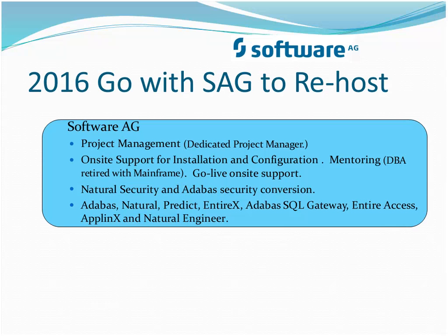So in 2016, we signed the contract with Software AG to do our replatform. And what Software AG brings to the project is they're going to be the project management. This was really critical that Software AG did this. We didn't have the people to become a full-time project manager. We are down to enough people just to run the systems we've got and to support them. We don't have somebody that can spend full-time running this, and also it's a skill that not everybody has. So Software AG gave us a project manager, full-time, dedicated, working just on our project.